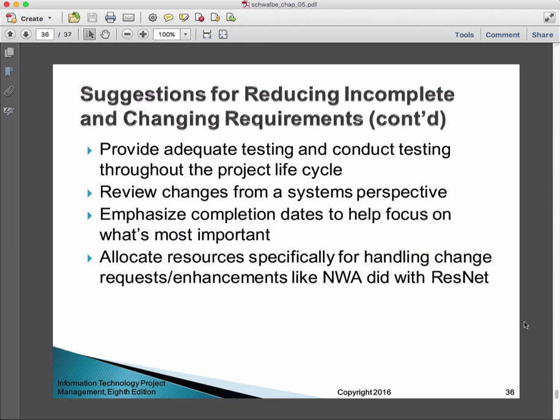And we had a budget in two respects. One is we took the total dollars and time for the project and said, we're going to expect a certain amount of changes to come along. And so we've reserved a certain amount of money and a certain amount of time to accommodate those. Okay, and then every time we approved a change, we would pay for them out of that budget.